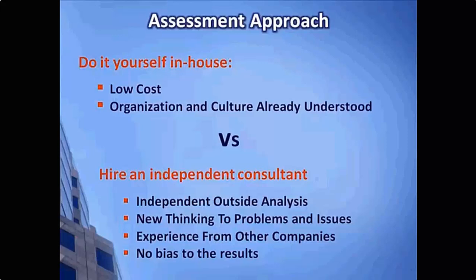It is strongly recommended that an independent third party be used to perform the assessment. This ensures that a fair independent view is provided. When you look for an outside third party to do this, they should have IT operational management expertise combined with the ITIL expertise. Preferably, from a certification aspect, they're ITIL certified at the practitioner or higher level.